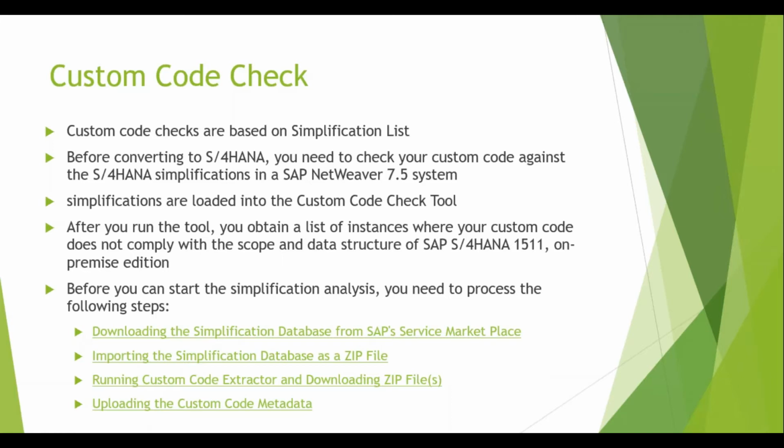So this is very important, and the customers who have already invested a lot of money and time in making sure that these custom codes are available for them to use, the reports, forms, or whatever it is, are definitely not going to be interested in wasting any of their effort by being told that this is not going to be supported. That is the reason you need to run this tool well in advance in ECC itself, to provide complete information on the different custom objects available, which are going to work as they are, and which need adjustment before they can be used in SAP S4.